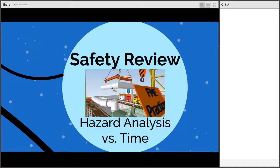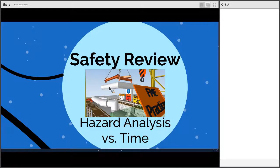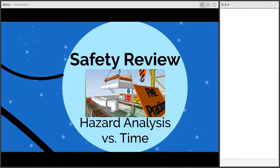So maybe you have an overhead hazard that you determine, okay, we got a steel structure. Until we have a metal deck on that floor, anyone's excluded from going in underneath it. Maybe you create within the schedule a safety exclusion zone, or maybe you have a fall protection area that's designated as it moves through the project. Really, there's electrical hazards, really any potential hazard, swing radius to a crane. If you can model it, you can put it in the schedule.